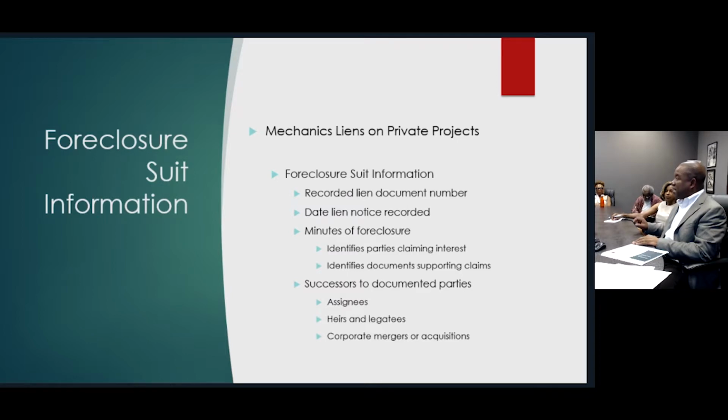On the lender side, because remember the lenders are involved in this as well, you would have to check existing bank records. So let's say that the bank sold its mortgage on this property. You'd have to check their records to see who they sold it to, and it's possible maybe it was sold again. But you have to exercise that due diligence to make sure that the lender or the interested party that has mortgaged this property is also notified. Okay. Okay.